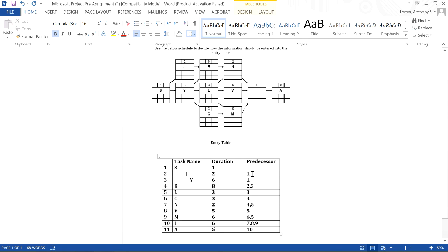That's it. These are the fundamental principles of creating a schedule in Microsoft Project and Primavera P6. I created this just to get the fundamentals of understanding what is needed and how it's going to work. Duration is needed, the predecessor is needed, and the position of where they are is needed. We can all get the same schedule at the end of the day as long as we are consistent with what the predecessors actually are and at what position they are in.